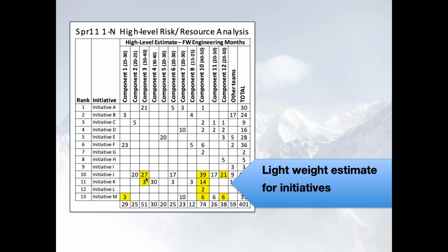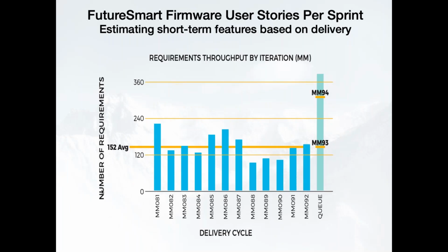And then after that, pretty much everything that we did was focused in on the requirements and how much value we were getting through the organization. We'd have a backlog of the requirements that were in queue. We had an idea how much was getting done each month. And instead of planning these in detail, we stayed heads down just working on this prioritized backlog and trying to optimize the flow and the productivity of the organization to get as much done as we possibly could. We didn't plan these in detail.